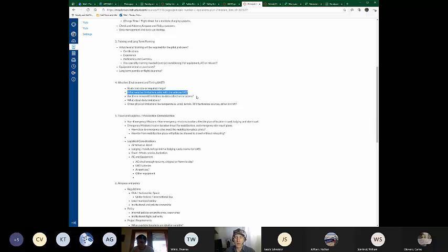Okay, are there seasonal limitations to data collection and access? So this is a big thing with vegetation survey or wildlife survey, where our target is only going to be available at certain times of the year. So these are things to identify. For example, we want to do Grandpa's farm, and Grandpa has beautiful flowering dogwood trees. We would love to have that in our three-dimensional model. So we know we want to fly between April and June because that's when the dogwoods are flowering, as an example.